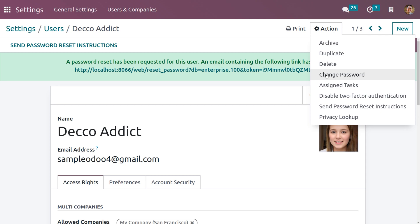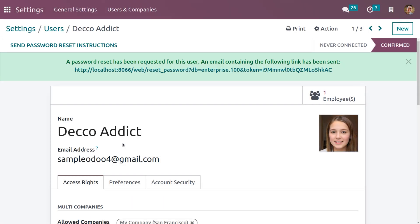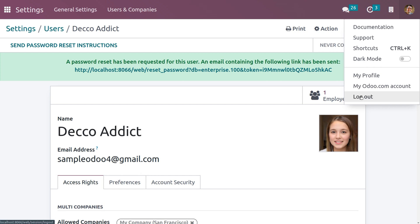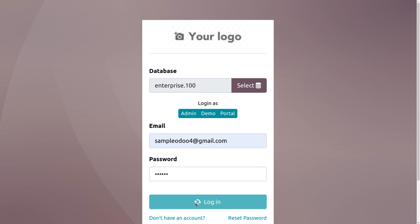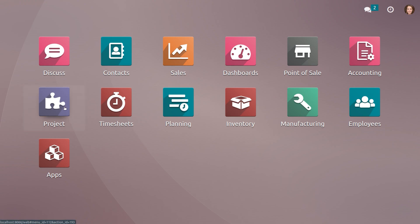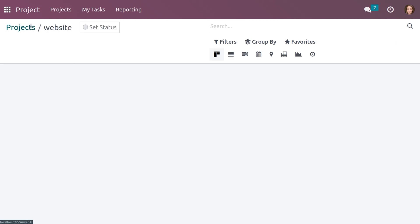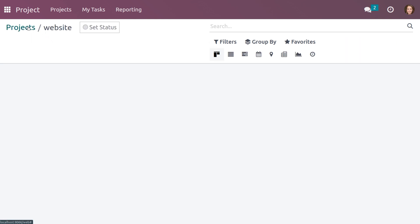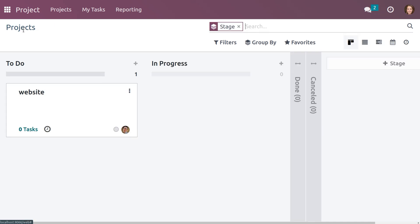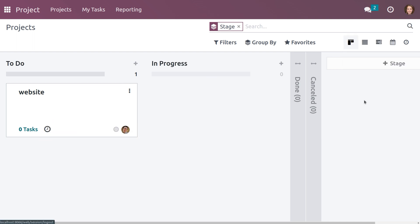Let me change the password and click on 'Change Password'. Now let's log out from Michelle Admin and provide the mail ID of Deco Addict to log in. When you get into the project module, you can see that as Deco Addict is a follower of this project, he can view it. However, he cannot make any edits — he can only view the project and other details.